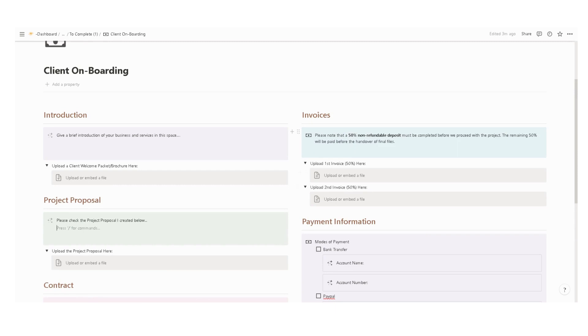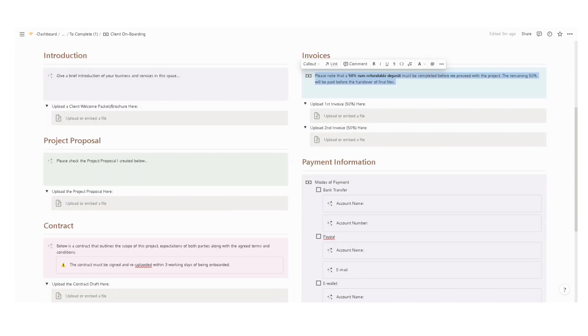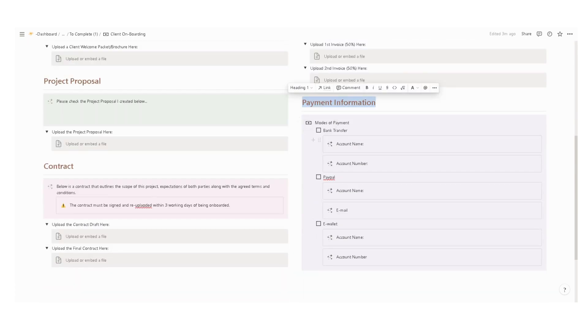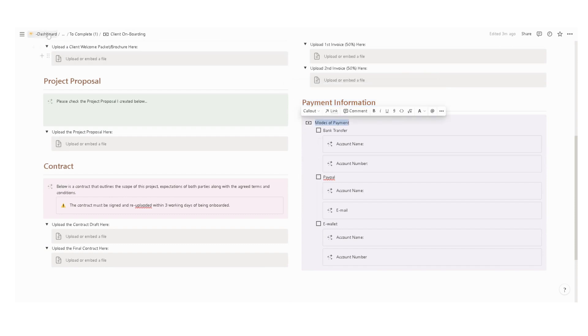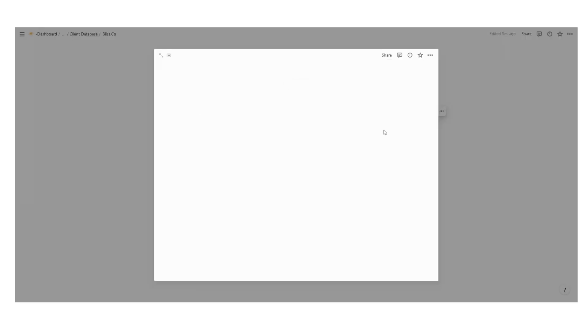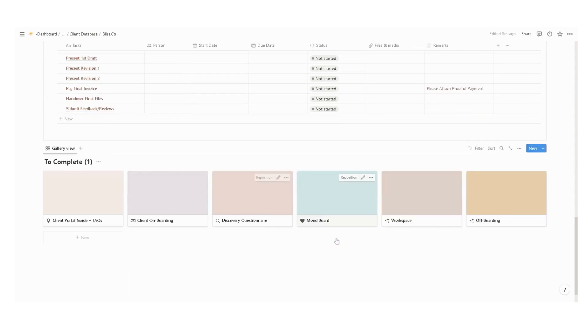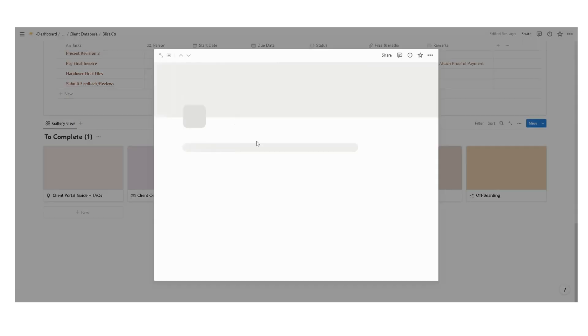Upload the invoice and enter some instructions. I personally require a 50% non-refundable deposit before proceeding with any projects. I also input the payment information, the modes of payment available, and the account details.